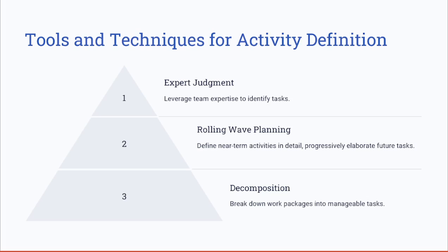Now let's understand the key ITTOs, or the key tools and techniques, used for defining the activities. The first one we have is decomposition. Decomposition is a key tool for breaking down work packages into manageable activities. For example, when building a bridge, you can decompose it into activities such as lay the foundation, construct the pillars, and finally install a deck.